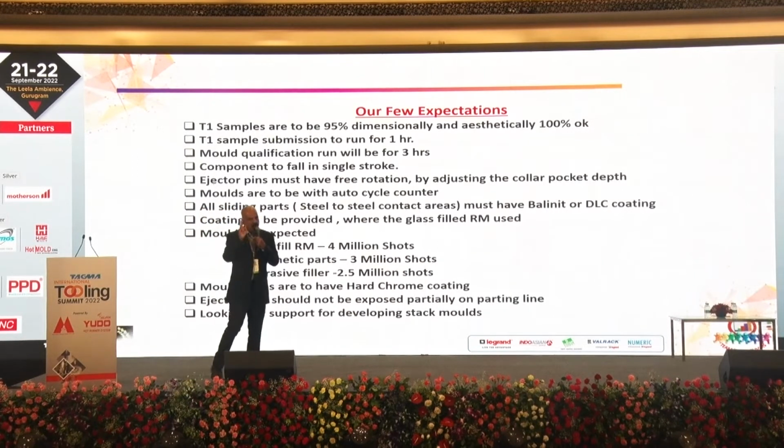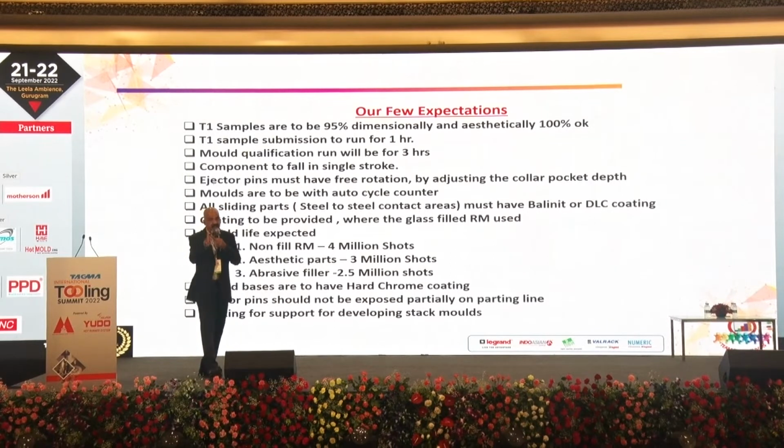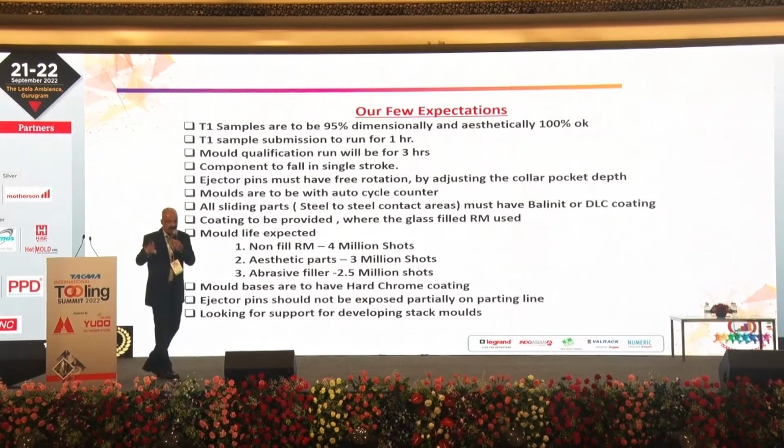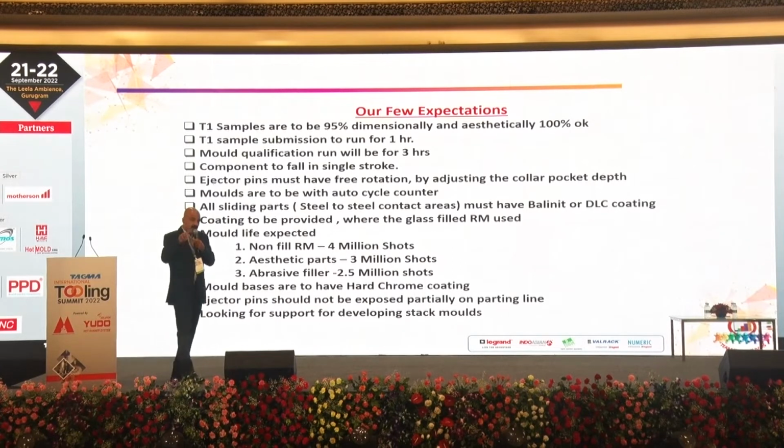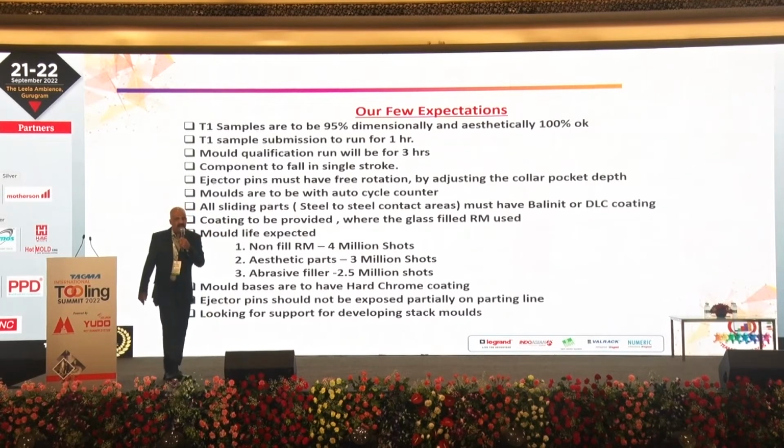My target is that once the mold is qualified, it comes to the factory, and within 8 hours the mold should be commissioned and production should start, which is happening today. But I take some pain behind that. And that is mentioned in the equipment specification.